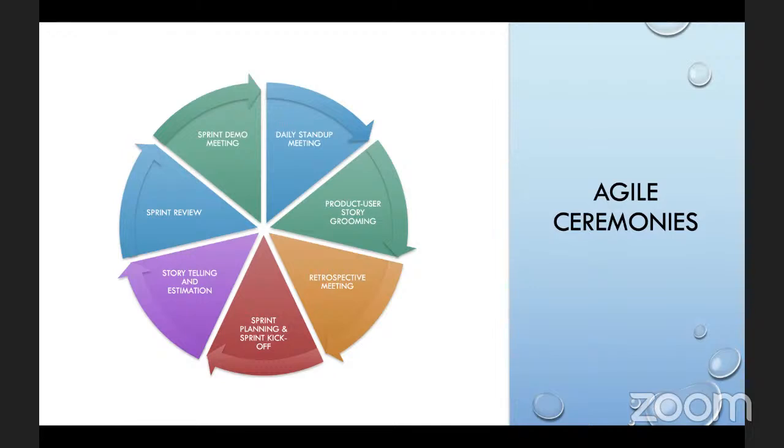Team members will just say 3 points, 5 points. The 3 points or 5 points they're talking about means something to them because they've established those norms. They could say 3 points means 3 days of work, 5 points means 5 days of work. They could say this story is 1 point, a 1 day's work. They could say this story is 2 points. Different teams have different meanings when it comes to story point estimation, right?